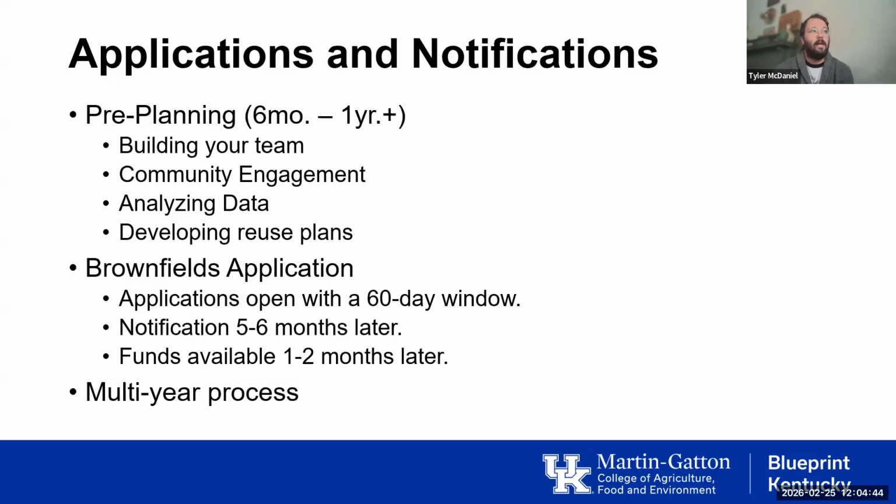That begins with pre-planning, of course, building your brownfields team, doing community engagement, looking at data, developing reuse plans and opportunities, really figuring out what direction you want to go in. We recommend 6 months to a year, if not longer, on that. Some of these projects can take longer depending on the complexity of the site itself and of ownership and things like that.